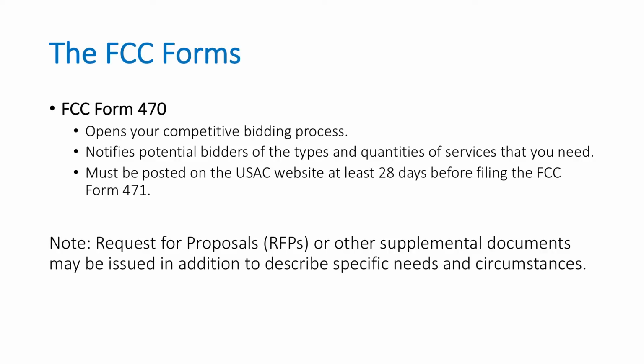So that becomes very important because the 470 window is very long. It's very open. It's basically, technically, it's never closed. However, the 471 window is a defined date range, and that defined date range needs to be a big factor of how you are planning your 470 competitive bidding process, evaluation, etc. That all has to be done within the compliance of the E-rate rules and also state law as well.